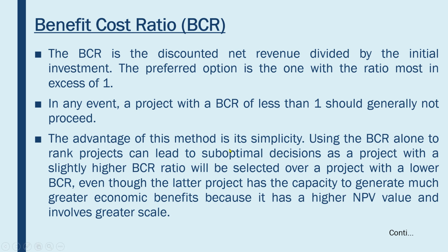The advantage of this method is its simplicity. Using the BCR alone to rank projects can lead to suboptimal decisions, as a project with a slightly higher BCR will be selected over a project with a lower BCR, even though the latter project has the capacity to generate much greater economic benefit because it has a higher NPV value and involves greater scale.